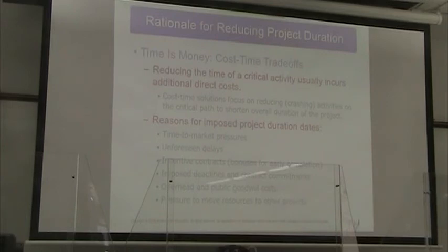All right, so we might have these 6 reasons, and there could be even more. Time to market pressure. We can't put the product on the market on 4th of July weekend. We have to get it started sooner, and so now your project end date has to be June 6th, so that we can start getting that product out and marketing and advertising it, so that by 4th of July we've got good word of mouth.